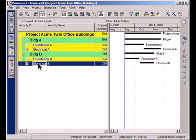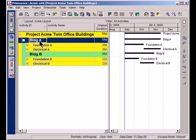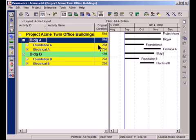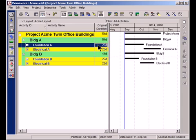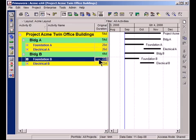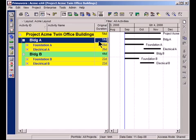Also want you to notice that these green and yellow bars here are giving me summary information about all of the work going on in each section. So for example, I can see that it takes 28 days to do all of the foundation work for Building A whereas Building B is a little bit shorter, it takes 22 days. Overall Building A is 54 days in duration, Building B is 44 days.